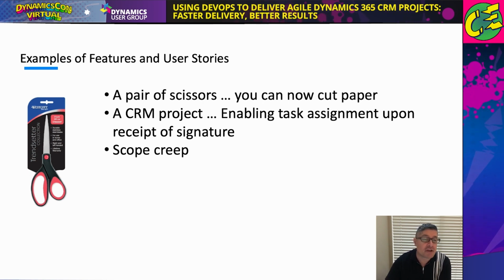I need to know when the contract is signed and for which salesperson. I need to create a task and assign it to that salesperson. And I need to have a salesperson see it on their dashboard. 3 user stories, 1 feature.